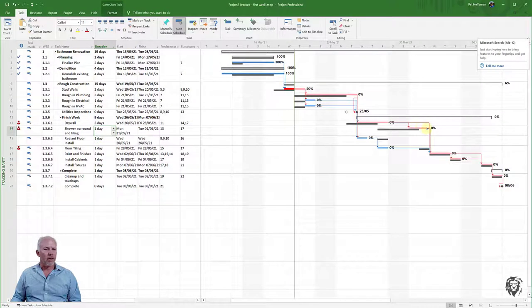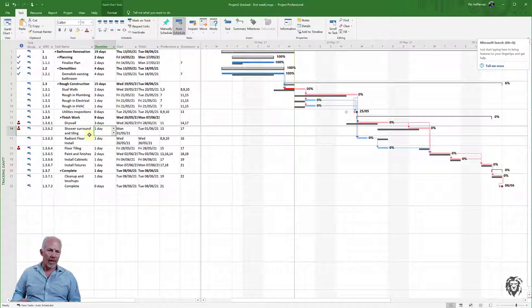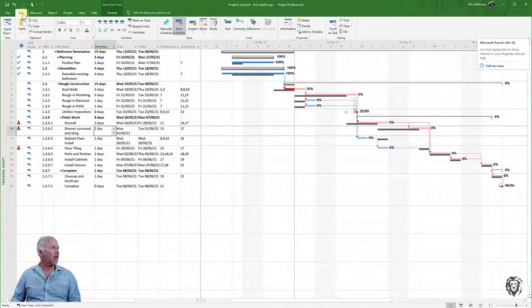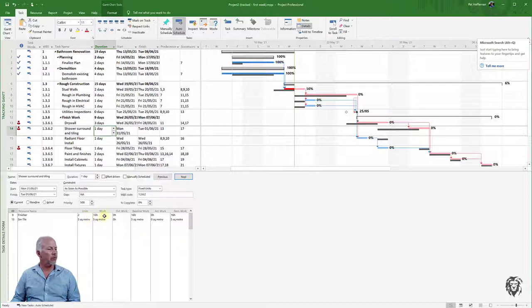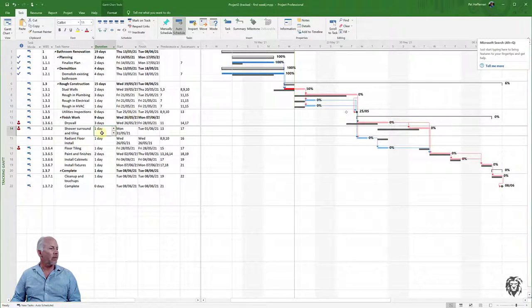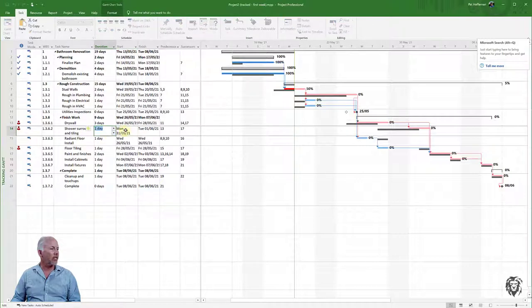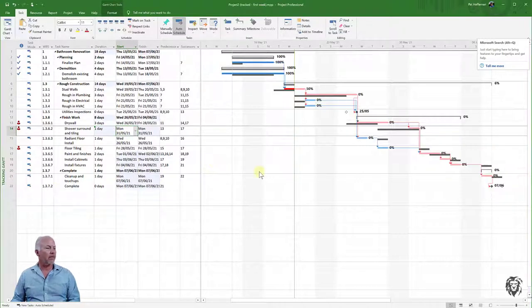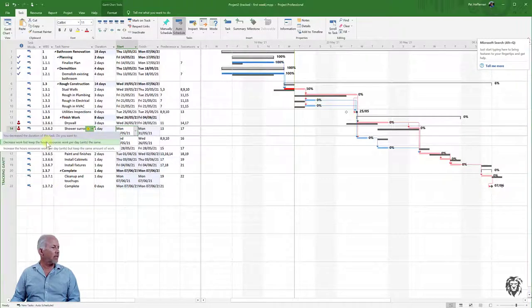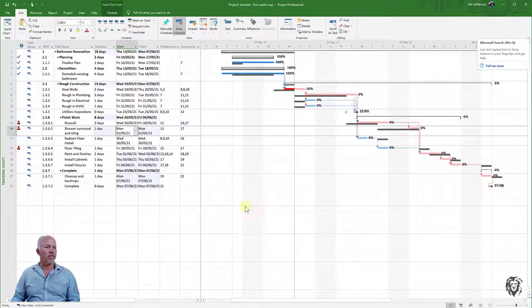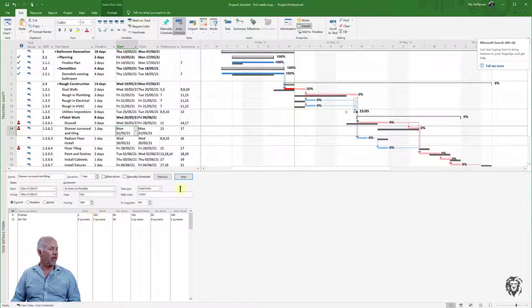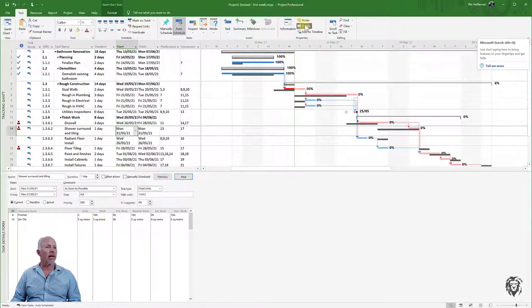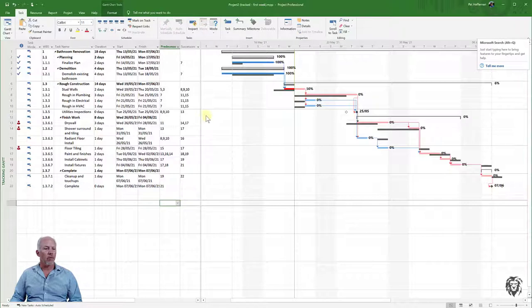I notice the Gantt chart hasn't updated even though the duration has. I can check to make sure the work is correct by going to Task Details—it should be 16 hours of work with two resources for one day. The easiest way to make Microsoft Project update is to manually change the duration and change it back. Now everything's working. When we say decrease work, we keep the hours and resources the same. You can always check your details to make sure everything is as expected.